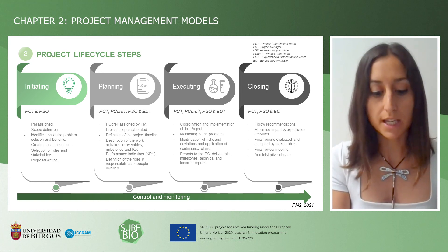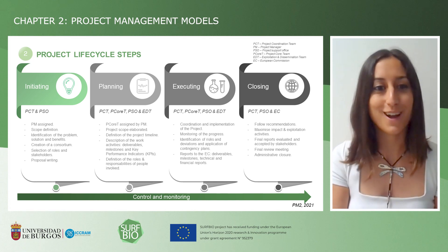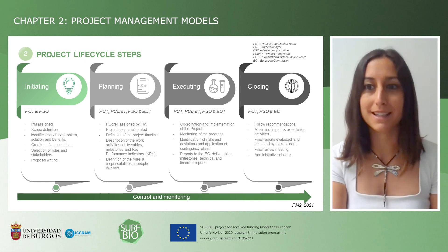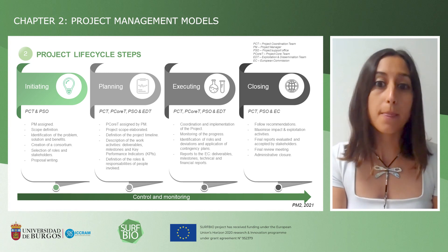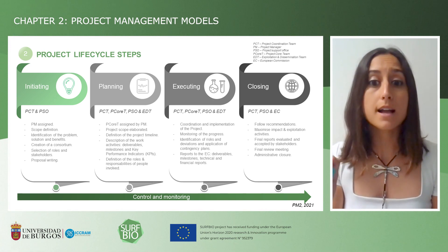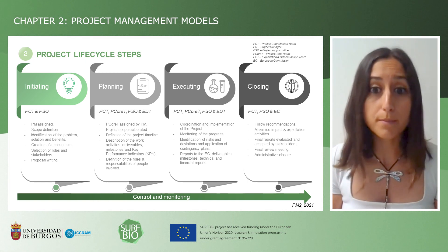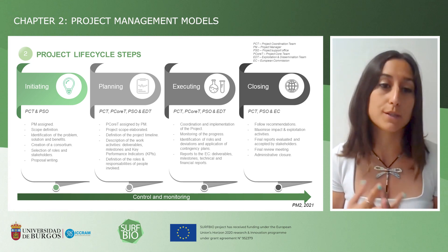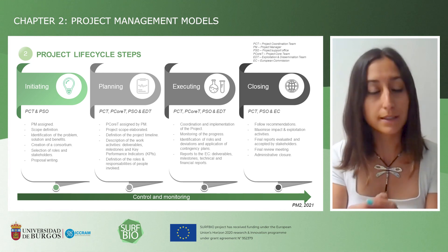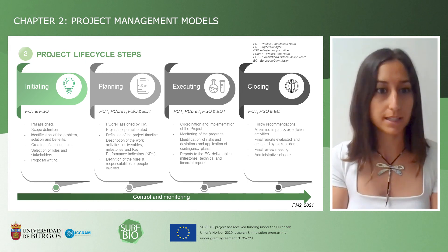The initiating phase, which will be explained in more detail by one of my colleagues — so you can check her video later on — is comprised by the project coordination team and the support office. During this phase, a project manager is assigned and the scope of the project is defined. We need to identify what the problem is, which solution we want to implement, and what the benefits of our project are. Then we create a consortium from experts within the topic we want to develop, select roles and stakeholders, and then the proposal writing starts.